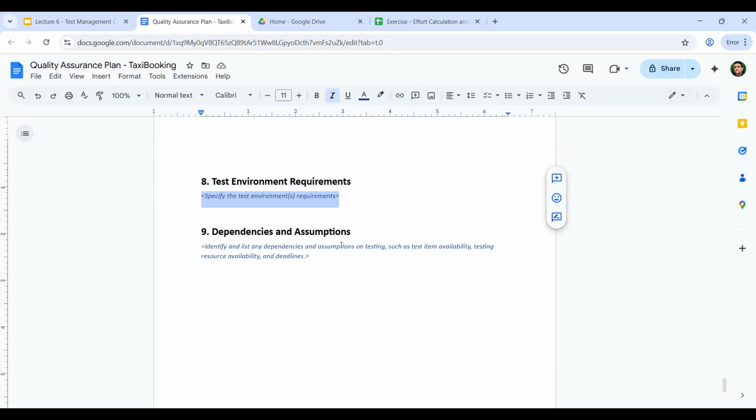So you have to state that to start the testing, there's a dependency on the production management and live operations teams to provide relevant test data, masked or jumbled or whatever they are supposed to do. They have to mention it. And there will be other dependencies. You might not be able to start the performance testing until the first round of testing is completed and defect fixes are done. So if that is delayed, your performance testing will be delayed. There's a clear dependency.